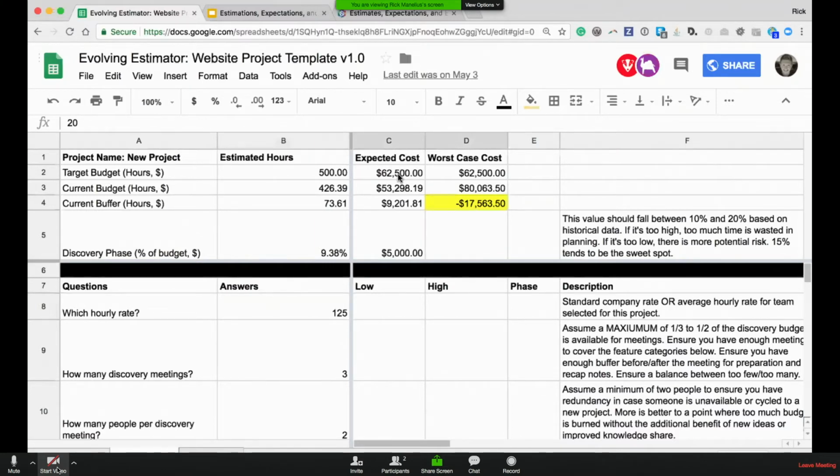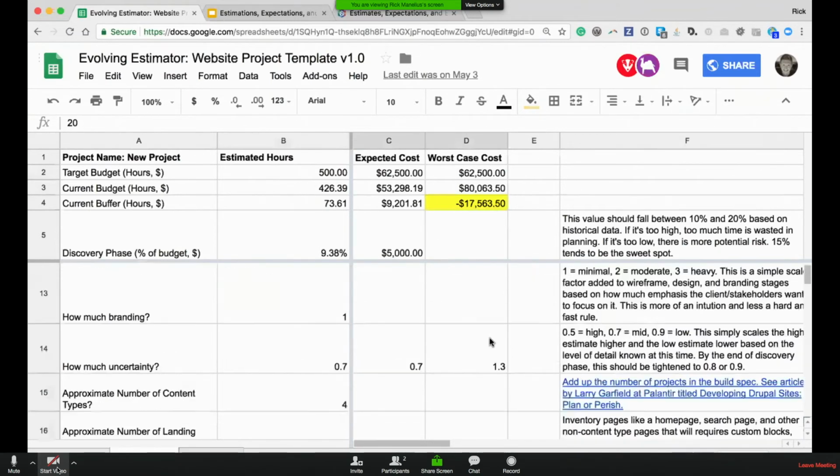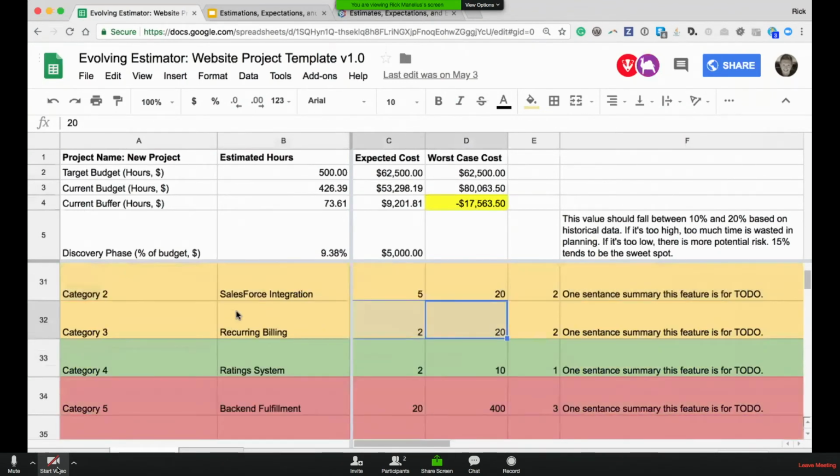Your team has access to this document, and since Google Docs has revision history, you can roll it back. You can say, look, when we did the RFP, here was where I estimated. Here's why I estimated it. When we got into the discovery after the 3 meetings, we updated it to be this. We got in the design phase. We identified some new line items. We put them in there. We recognized some things were in scope, so we green-lighted them. We worked with you to make that work. So we had to take something in green into yellow, and we ended up with that number. And the whole history of that conversation becomes a single source of truth updated along the way.